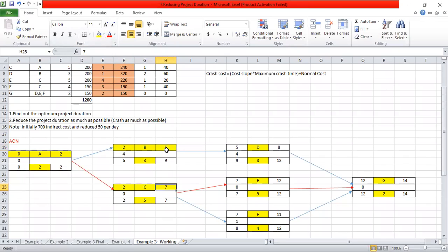And for the late start, you are getting early start, early finish, right? For the early start, you are adding the duration and you are getting the early finish time. So this 5 should come here. Now, in the forward pass, if there is nothing else, we take this 5 here directly. For that 5 you are adding the duration of 3 and it is now 8.